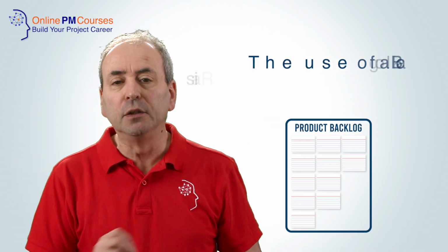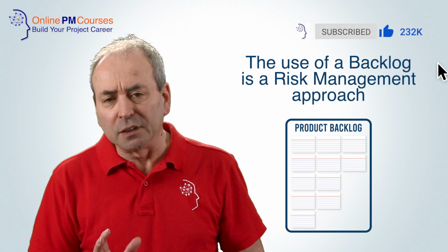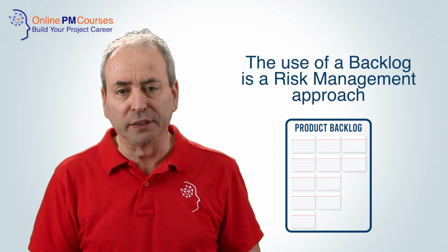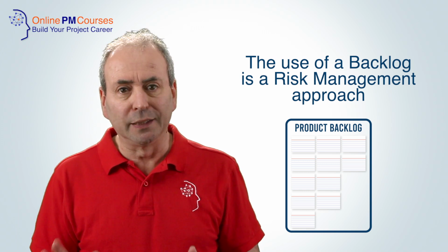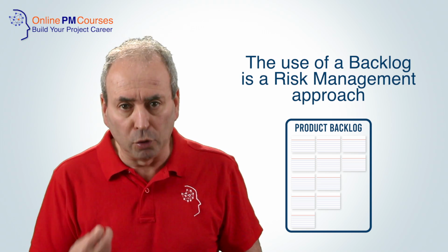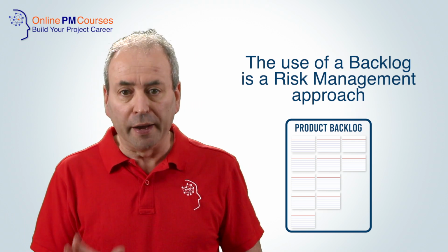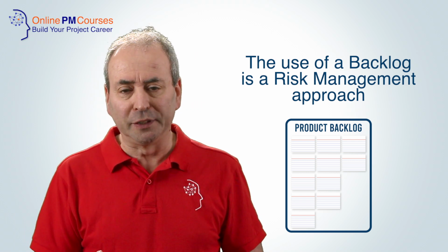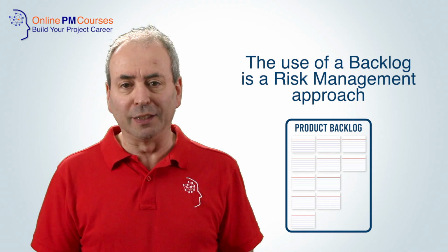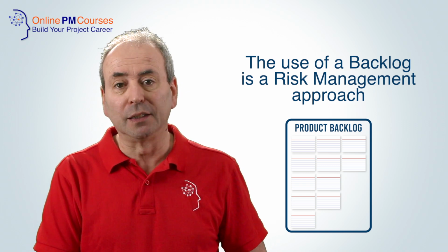Third, the use of a backlog is also a risk management approach. Firstly, it allows us to defer high-risk activities and user stories, usually the ones with the greatest level of uncertainty, until we have more experience. That means we can have more knowledge and therefore reduce the risk. But also by deferring high-impact user stories, we can wait until the team has more skill, more experience of working together, and therefore a greater chance of mitigating the impact of any failing.